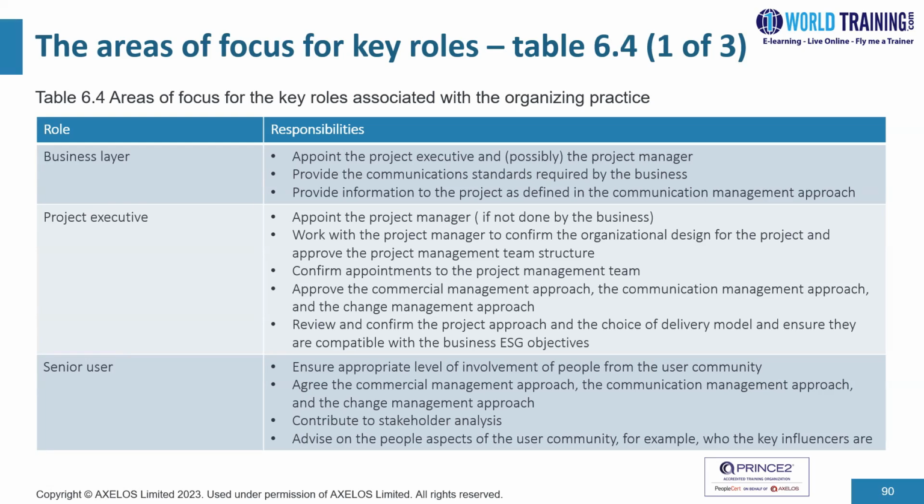When it comes to the senior user, they ensure an appropriate level of involvement of people from the user community. The senior user would agree the commercial management approach, the comms management approach, and the change management approach. The user would contribute to stakeholder analysis, and advise on the people aspects of the user community, for example, who the key influencers are.